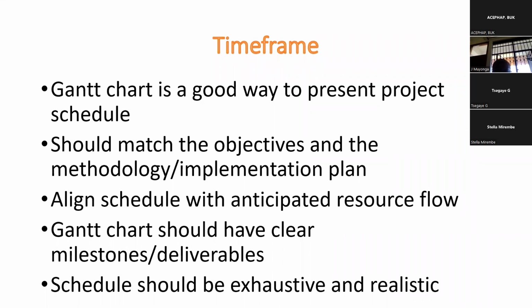You've mentioned that M&E is going to be done annually. Let it also match with what you've described in the M&E section. If you're going to do your experiments 2 seasons a year, let it also be reflected in the Gantt chart. That coherence of the different components of the proposal is extremely important.